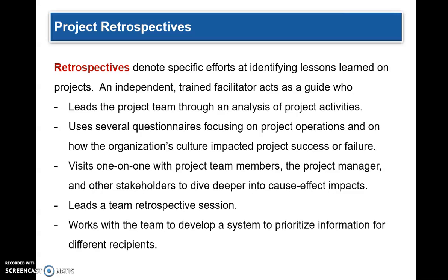Retrospectives basically tell you the specific efforts and identify lessons learned. Usually, a trained independent facilitator acts as a guide and leads the project team through the analysis of the project activities, uses several questionnaires focusing on project operations, and interviews the project team members, the project manager, and the stakeholders to see any cost impacts or any other impacts that the project has been through.